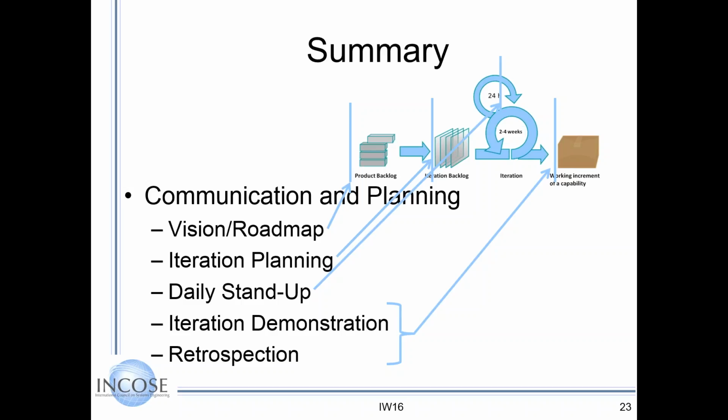The next presentation goes into concepts when you've got multiple parallel teams, and then the role of the system engineer and how important that role is. In some cases, if one team identifies a complication that then impacts another team, then perhaps that's a risk that needs to be brought to the program level and addressed. So risk is really embedded within the Agile process. It's nice that risk items are brought up and dealt with on a regular basis. Yeah. Okay, thank you, Emiliano Lopez, for that question on risk.